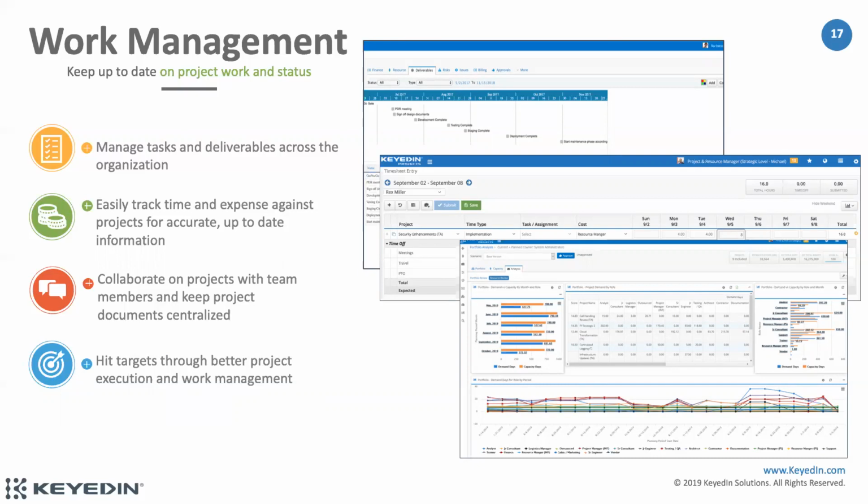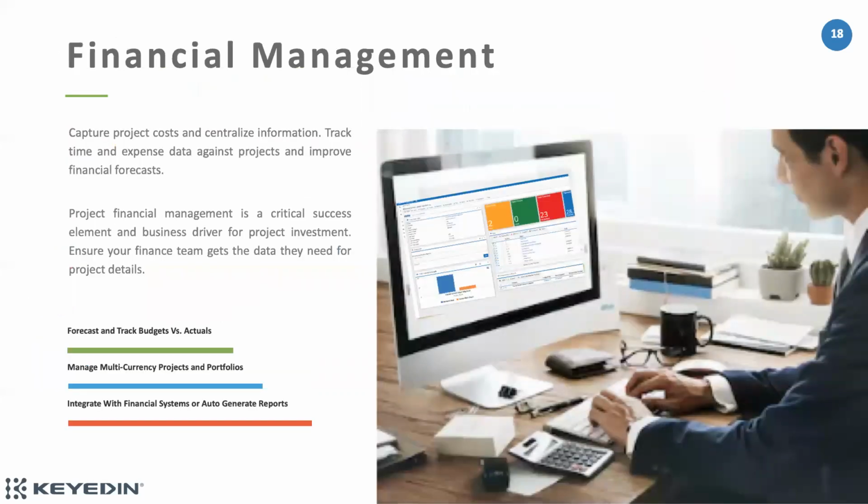You're going to want to make it very easy for these people to not only know what they're working on, but also update progress, enter their time and expense to accurately capture actuals and feed into your projects. So get everything on a single sheet of music and make sure that the updates from the team are centralized so that the information is timely and accurate when it comes time to evaluate status or generate reports.